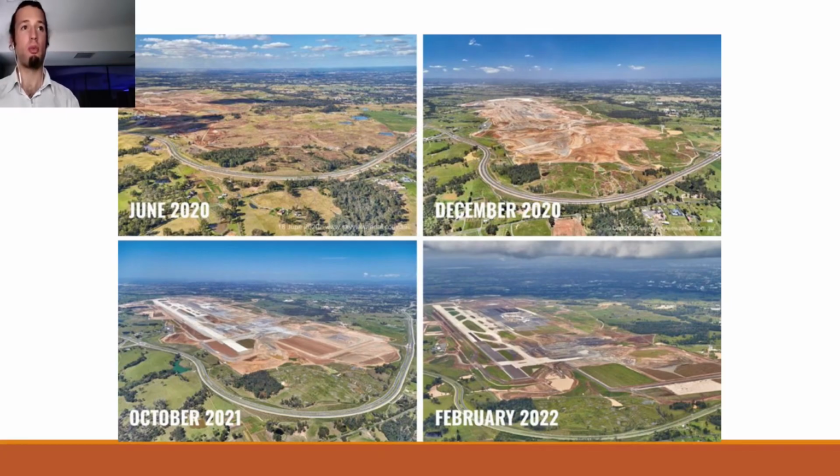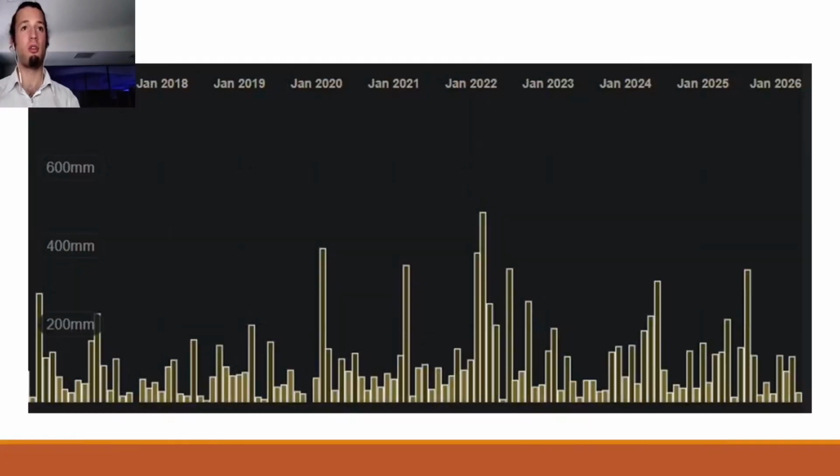conditions. Moving 22 million cubic metres of earth is a massive logistical feat on a good day, but the project launched directly into 2 consecutive years of La Nina. Instead of the median 650 mils of rain, the site received over 1,000 millimetres annually. In a landscape where catchments were transitioning from 16 down to 5, the risk of sedimentation and site-wide washouts was